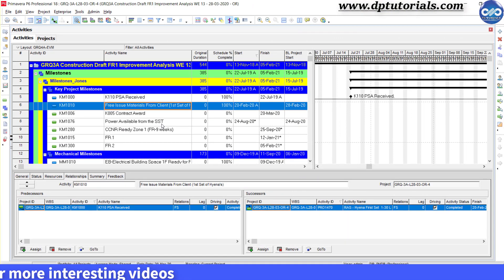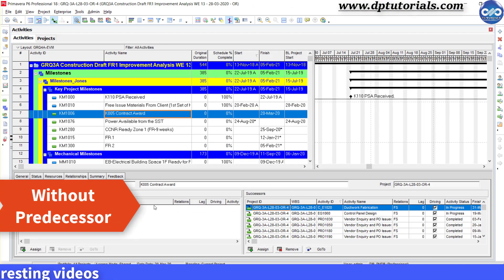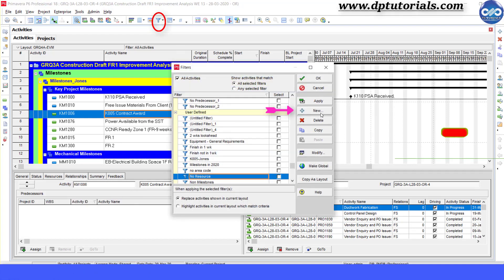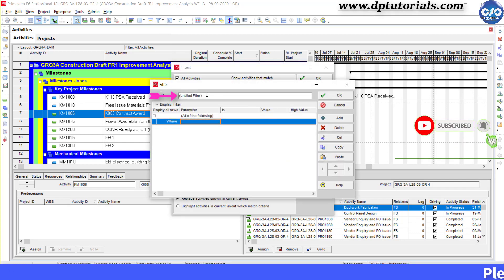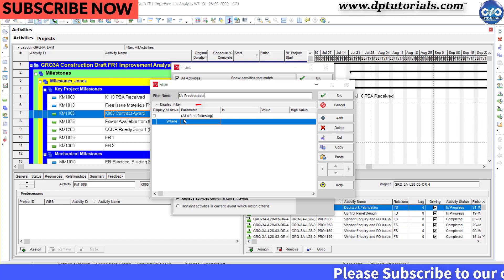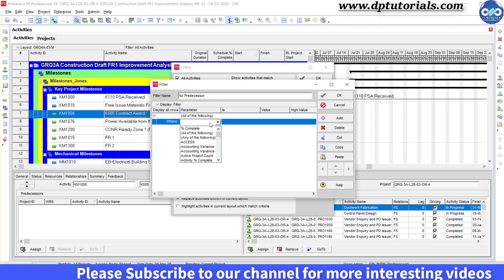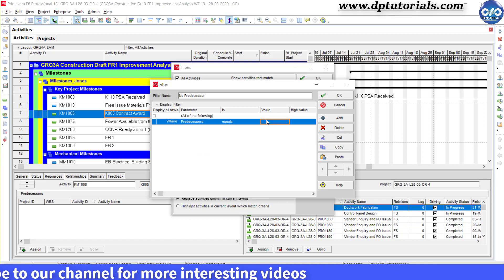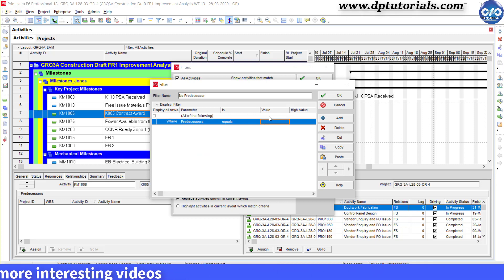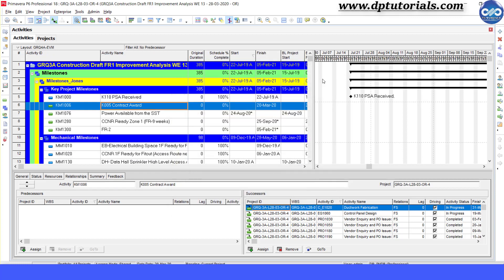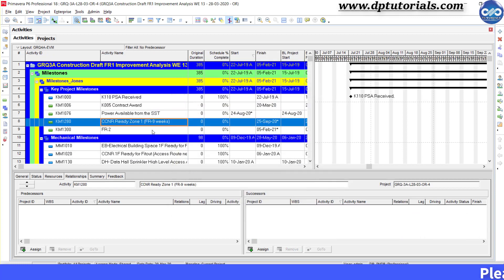First, let me show how to filter all the activities without any predecessor. Click on the filter icon, then click on New to add a new filter and name the filter as 'No Predecessor.' Now give the filter criteria as: under Parameter, select Predecessor, condition as Equals, and leave the value as blank. Now click OK, and click OK again. Now you can see all those activities without any predecessor.